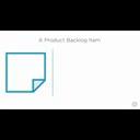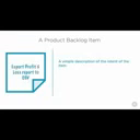We'll start with a description. Now, I know what you're thinking. Most of these items have only a single line of text. They haven't captured nearly enough detail for us to build from. But that's actually intentional. Rather than thinking of each item as a complete requirements document, instead, think of each item as a placeholder for a conversation.